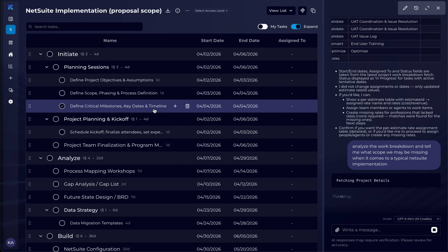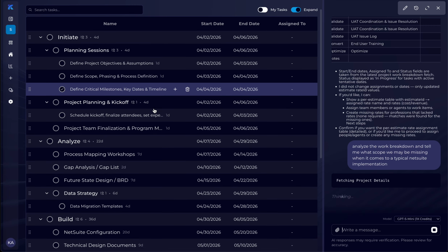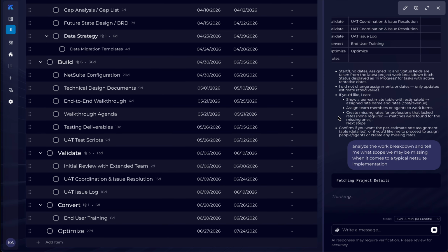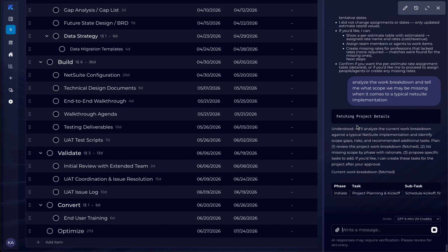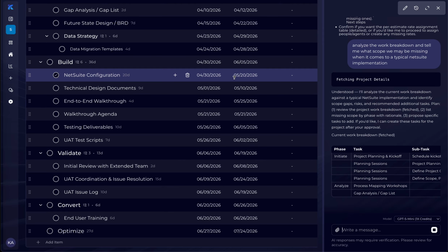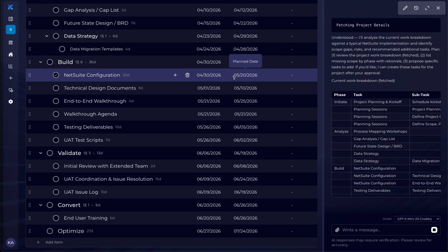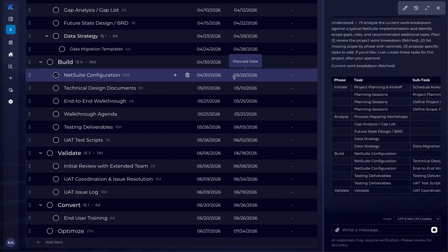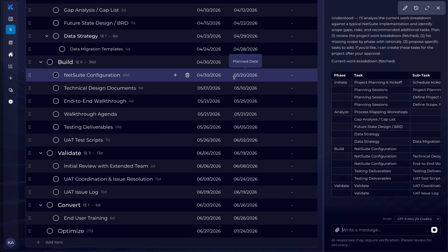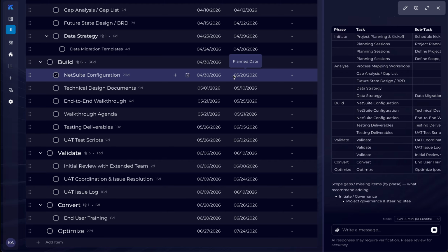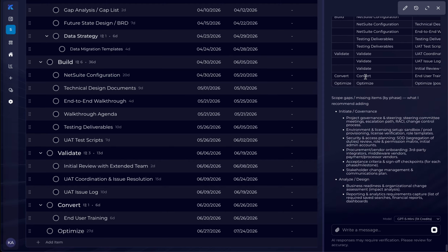Sometimes it's just oversight because you uncover more scope later, but sometimes it depends on the experience of the company and the vendor and the team, and what level of detail they're able to provide. And sometimes the vendors eat the cost if it's a fixed bid, but what you've got to watch out for is if it's a T&M project, the vendor may typically come in with a very high-level estimation of scope because everything is T&M, and then you end up paying 2 or 3 times the cost of the actual project, which you didn't budget for.